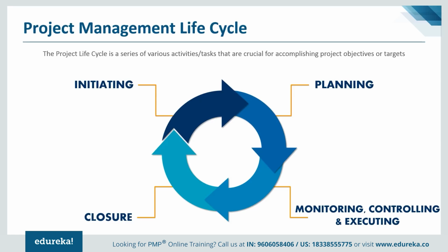If there are any ambiguities between the customer and the project manager, or the project, that are not resolved and are still pending, even in the closing stage we would prefer to speak to the sponsors and document those things, because the project has to close on the given time. If even with mediation we are not able to resolve it, then we document those items so that the PMO or other members can deal with it if required.